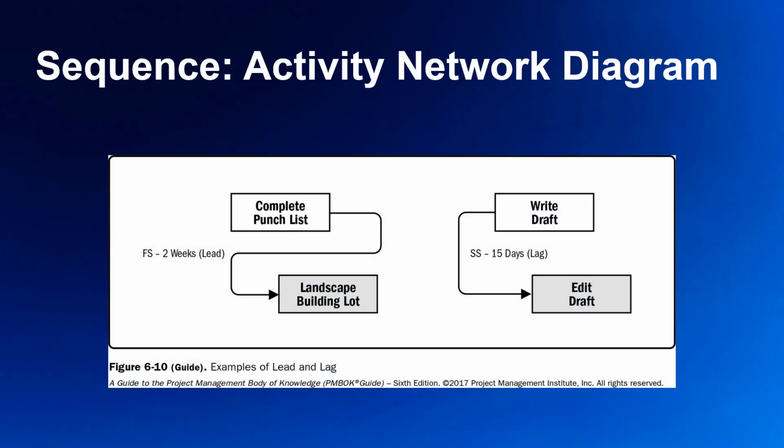And then, when the team examines the dependencies among activities, the total float in a path provides opportunities that allow lead time to overlap activities and compress the schedule. They should also identify any lags that add delay to successor tasks. The way we find these risks that may affect quality is by using the familiar precedence diagramming method, the critical path method, the critical chain method, or PERT, the program evaluation and review technique, along with schedule network analysis techniques.